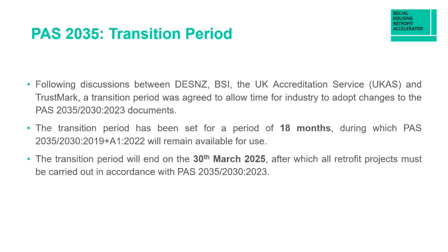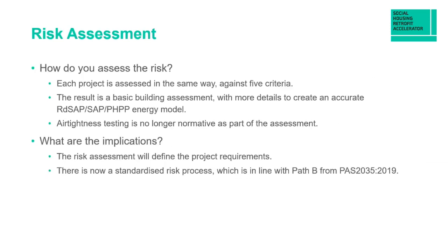That transition period has been set for a period of 18 months, during which the existing PAS documents will remain available for use. However, the transition period will end on the 30th of March 2025. So after that date, all retrofit projects must be carried out in accordance with the new 2023 standard.